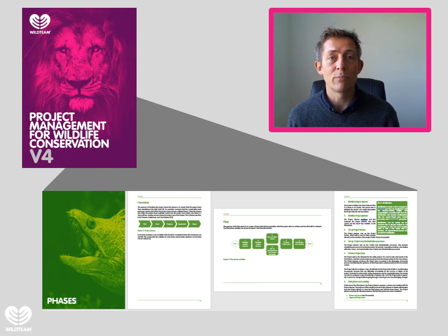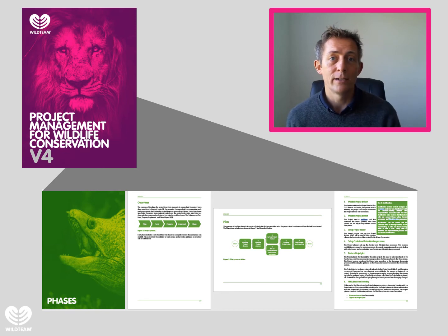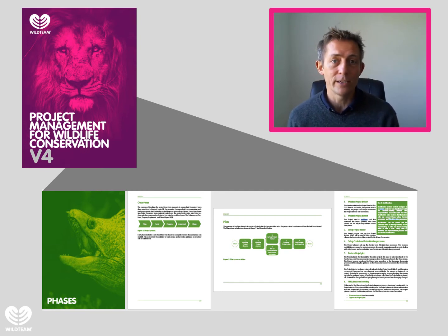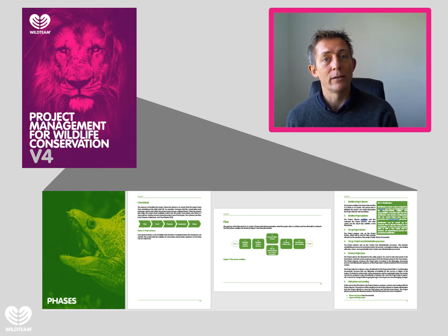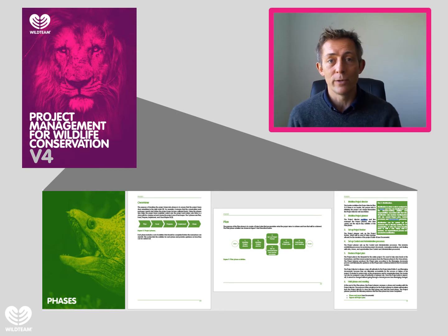The next phase is then prepare, where you've got the funds in the bank, and now you set up your team, set up all your processes ready for the main bit of the conservation work, which is carried out in the implement phase. Once that phase is finished, you then move on to the close phase, where you wrap everything up and stop any further activities on the project and report on the project impact to both your project team, but also to your stakeholders.